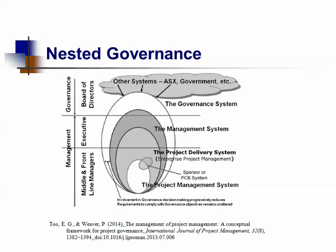The nested governance diagram shows the different levels of management. Governance flows from the board of directors down through the executive level to middle and front-line managers. The project management system and project delivery system — enterprise project management — with its sponsor is run by middle and front-line managers. Executives monitor this, and the board of directors uses other systems and government entities in their governance system with external stakeholders. Involvement in governance and decision-making progressively reduces as you move down, while requirements to comply with governance objectives remain unchanged.